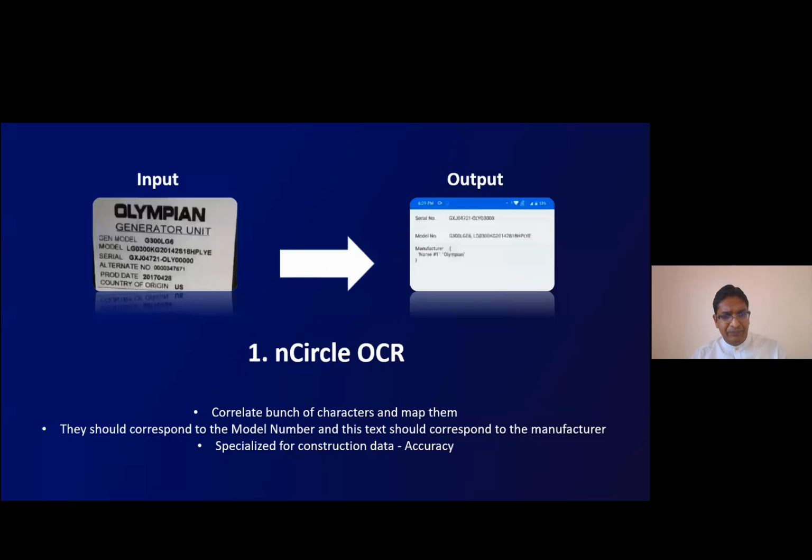Let's start with OCR. Now, field engineers and contractors of KTrack have to manually verify and copy text data available from asset nameplates and labels as a part of handover data management. This activity is done manually and is less than optimal, leading to human errors and wasted time. Overall, the process includes someone has to physically visit the location of the equipment, read the asset nameplates, and type in those complex model numbers and serial numbers into the mobile app. And then later on, someone else has to verify the same.